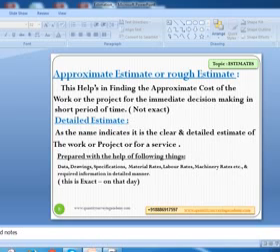So what you will do, you will calculate based on your experience, based on your previous projects done. So you have some immediate steps you will do, some immediate quantities, immediate rates you will take. Then you will come to some conclusion of the cost. That is approximate estimate.